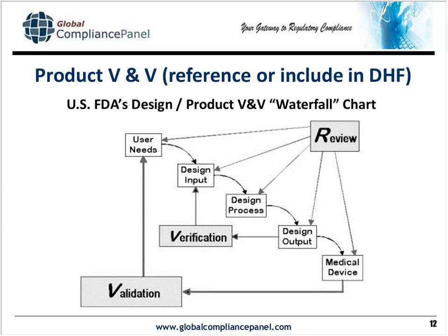But as you eliminate one of these elements, as you move down the line, if you will, you should have a gated release to the next stage under a design review with that disinterested third party as part of it. Verification then would be maybe comparing documentation to ensure that you've met all the requirements, and that would be verified by a document of some kind, an electronic record or a manual record, signed and dated.